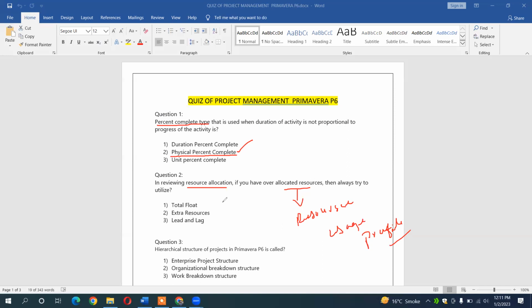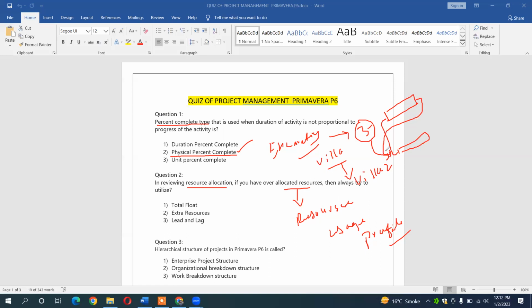The first method is that you should keep the activities on the normal track. Normal track means, for example, you have hired excavation labor, and your company assigns you a total of 3 laborers for it. Then, for example, excavation starts in villa 1, and other excavation has also started in villa 2. Definitely you can't utilize these 3 resources on both activities at the same time. So you have to always give a finish-to-start relationship, so that you run the project on the normal track.